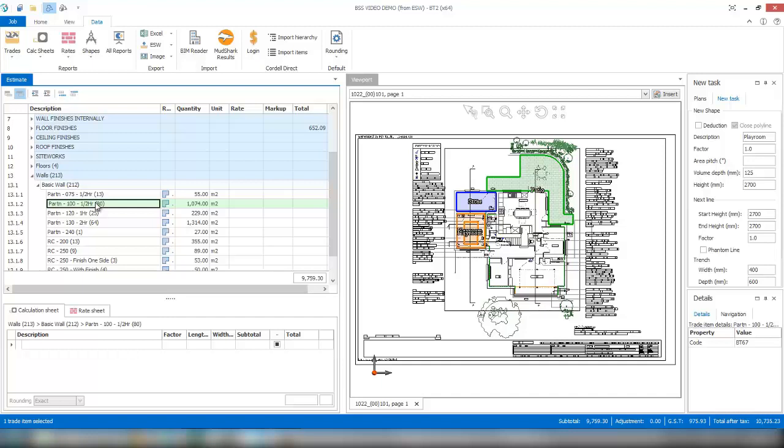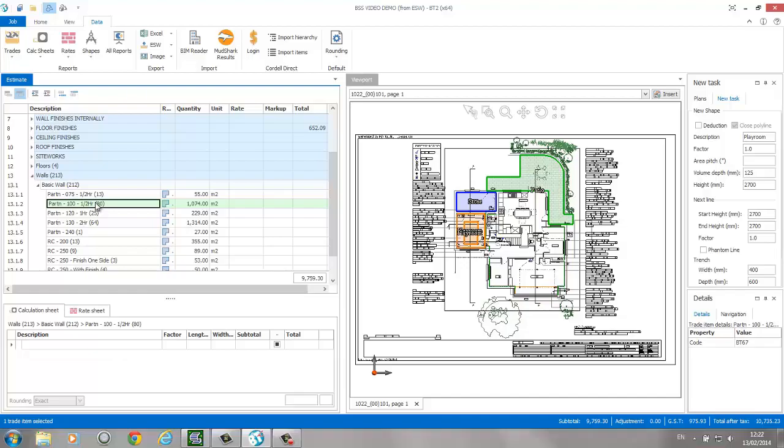As you use those quantities either on an estimate directly or through the global sheet to pick off quantities, and through using a bill of quantities, it'll link directly to it. If the model changes, the item will change, which in turn means the bill of quantities will automatically change for you.